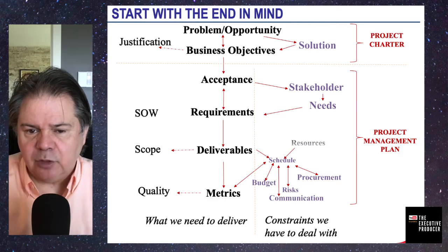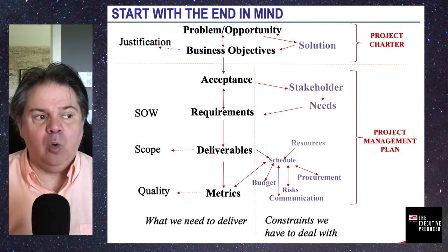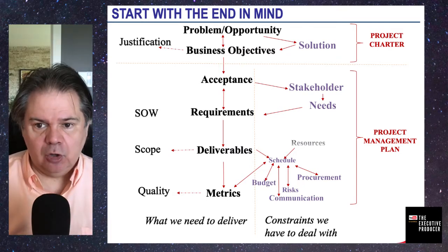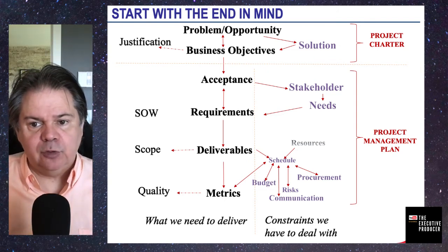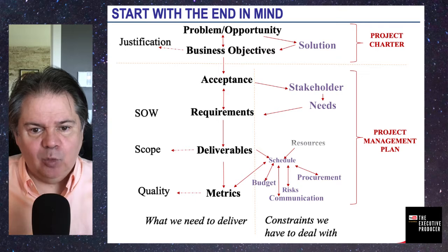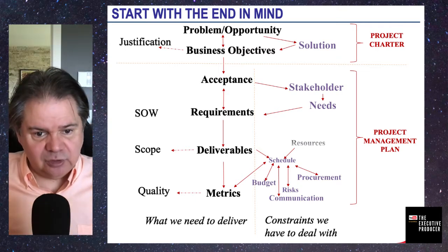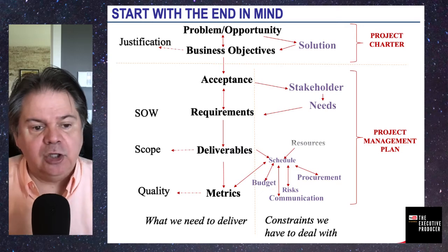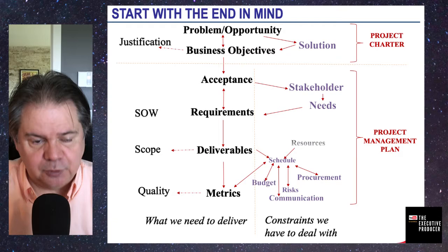There's a difference in terms of what do I produce versus how do I produce it, okay? What is an output? What is an activity? So you want to break it down to the minimum you could go in terms of what you need to produce without going into the how. I understand building a schedule, you continue on the decomposition, and you're going to get the activities the same way. But for me, the deliverable and the work package should be stopping at the what? The output. Should be all output.